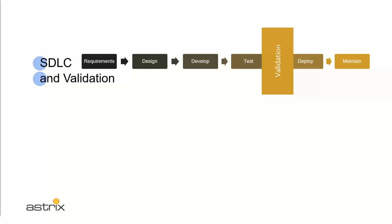The main reason for that is, well, validation was meant to produce objective evidence of those features that are present in the system, right? And it was thought logical at that point to start validation after the system is bug-free or production ready. This means there is heavy lifting all at once to validate the system. So working this way produces delays in production and go live dates as the validation team starts to look at requirements late in the SDLC process.